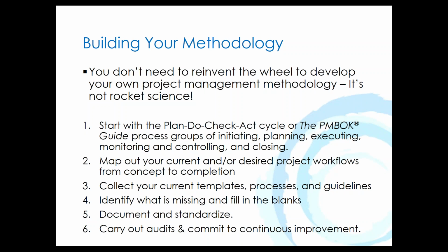Once you've done all this, you want to document and standardize your methodology. You want a process flowchart, you want a user manual, you want to make people know how your project management methodology works. Now, you want to standardize it so everybody uses the same thing, the same terminology, and the same processes. But you want to allow enough variation so that the methodology can be tailored for each project.